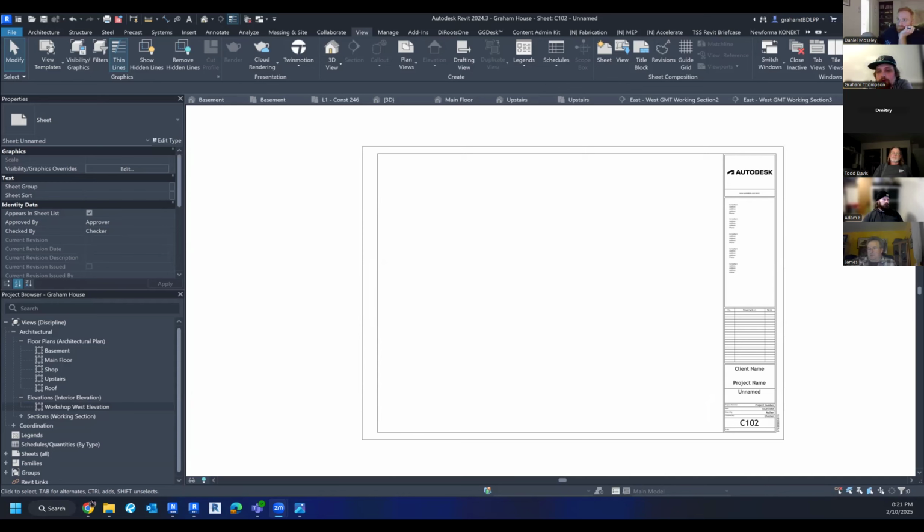How long have you been in project management? Like, I've been in construction on the ground for a year. Do you chase down submittals at all? I do, yes. You do. Okay. And how often do you get that submittal at the beginning of the project? Unless it's for like maybe landscaping or the final clean, you don't, right? So there's so many variables, and I can't wait to start modeling until I receive submittals.